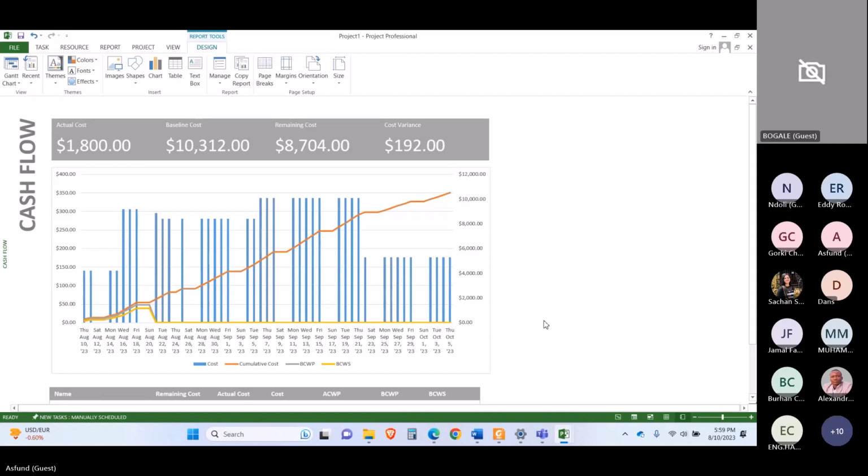That's a very good question, because the project manager will be the first one seeing this S curve and taking action. How will he take action? If he thinks the project is ahead of schedule, he will start to thin down the resources. He will extract manpower from that activity and send it to another project, because if the project is ahead of schedule, he's already saving a lot of money and time. So he will allocate those resources somewhere else.